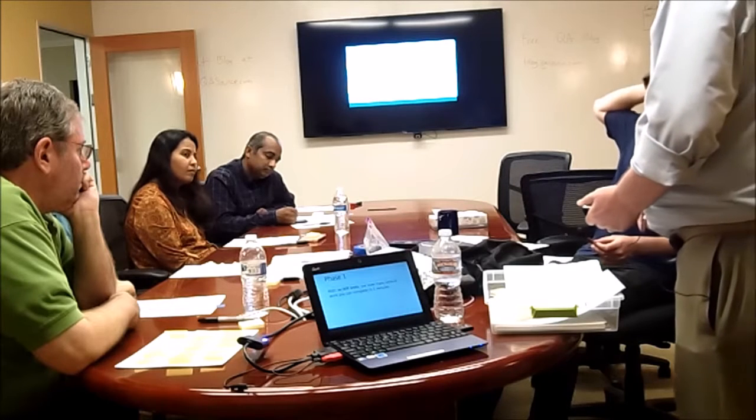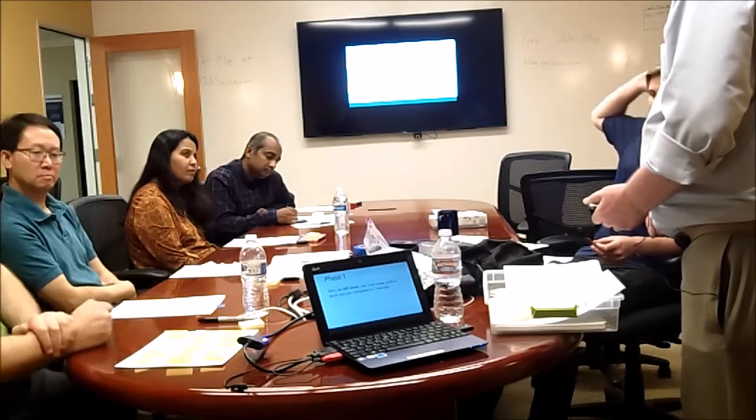The right thing to do may be to subordinate everybody else to the bottleneck, or to move the bottleneck to where you want it to be. So getting rid of it is not the first thing that you should jump to. Anyway, let's tally this up. Let's see how many units of work we got done.